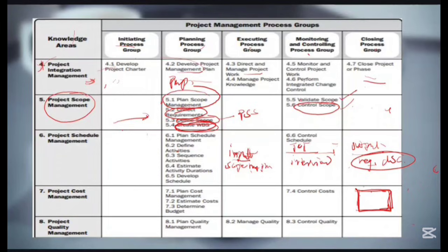Now, a person thinks we could do F. Where did that F come from? Was it something from the customer? Probably it was from the customer. The customer says, now I want you to add F. So this is a change. What happens? It goes to the CCB. The customer is asking for F to be done. Now the CCB will check, is it something that we can do? Then we check, is it going to delay work? Is it going to add more time? Is it going to increase the cost? We do all these assessments before we approve it.